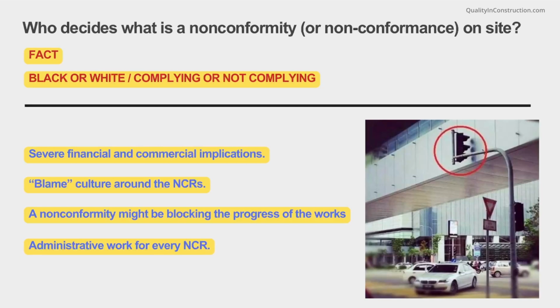Also, depending on the project, there might be quite a lot of administrative work to be done for every NCR. Many clients require an in-depth root cause analysis, documents and forms to be completed, and even objective evidence to be attached for each single NCR. During the rush of the construction phase and when the clock is ticking, all of this may sound as a luxury and more like a paperwork exercise that everyone wants to avoid. So it makes sense if people don't really want to deal with NCRs at the end of the day.